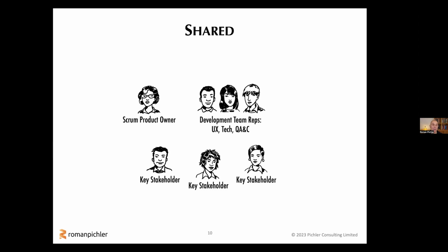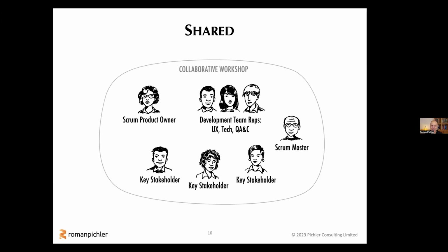So these key stakeholders for a commercial, a revenue-generating product might be a marketeer, a sales rep, a customer support team member, and possibly somebody from finance. Now, bringing those individuals together and having people collaborate, co-create a roadmap from different business groups, departments, business units can be challenging. People are likely to have different perspectives. They might have different needs and different goals. So in order to avoid that the highest paid person's opinion wins and the most senior stakeholder thinks, oh, this is great, this is my show, I'll make all the decisions here, I think it's helpful to have somebody who can facilitate.